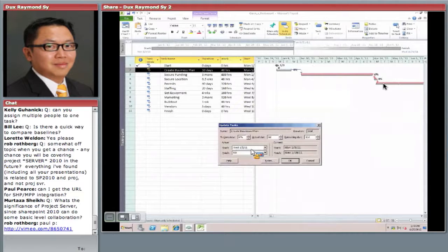I'm going to ask her, this task was supposed to be a 10-day task. How much time have you spent? Well, I'm already in day 6. So I'm going to put 6 days, actual duration. How much more time do you need, Elaine? Remaining duration. I'm not done yet, Doc, so I need 7 more days. Sorry, I've underestimated this task.